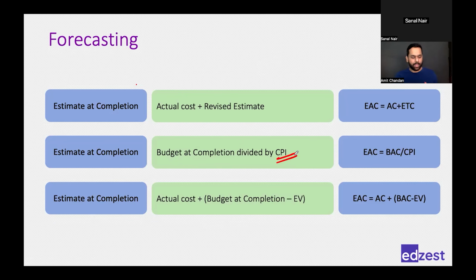This part? Okay. See, we were calculating our project. We have measured the earned value, we have measured the actual cost, and we understood that earned value divided by actual cost is 0.8, let's say, for example. In a way, it tells me that I am spending the money at 80% efficiency. Because if it was 1, then I am spending as per my plan. If it was 1.1, then I'm spending less than the plan, which is 10% better. So I'm doing it at an 80% efficiency rate.